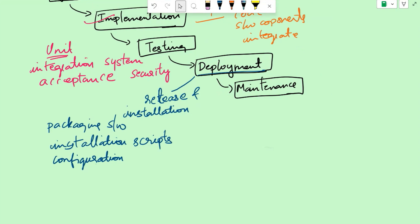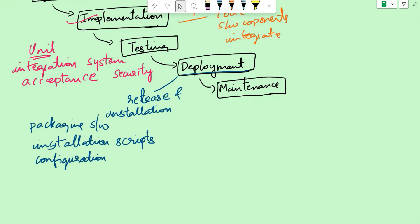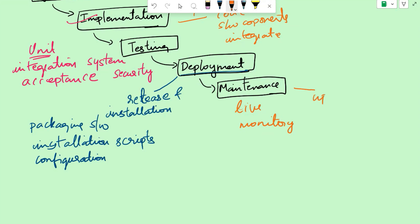Once the software is deployed, the maintenance phase begins. That is the last phase. This is the live environment. Maintenance phase involves monitoring the software in the live environment, addressing any issues or bugs that arise, and providing ongoing support. Maintenance phase might also include implementing updates or enhancements based on user feedback or changing business requirements. For instance, the e-commerce website may require regular maintenance to fix any software glitches, update product listings, or introduce new features based on customer demands.